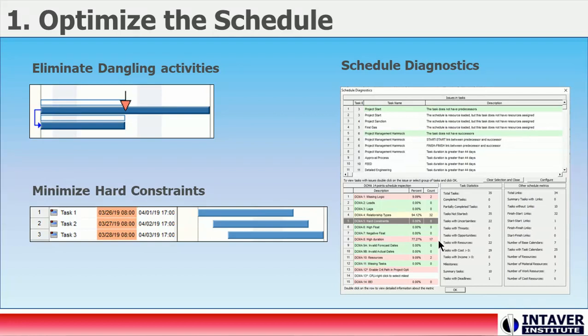Running a schedule diagnostic, such as a standard 14-point DCMA check, will allow you to quickly identify these issues and address them as appropriate.